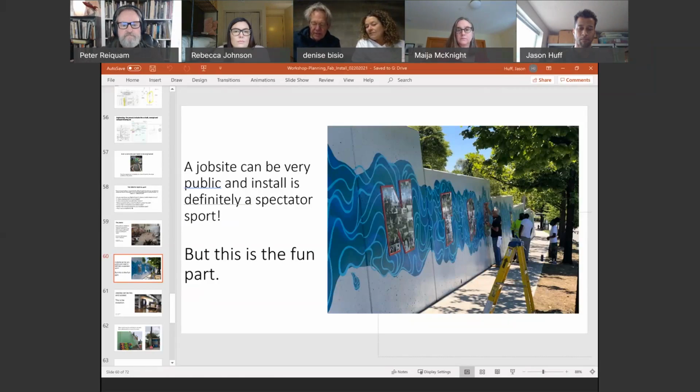I guess what I'm trying to say is your assumptions have to be noted to your client so that they understand what you have included and what you have thought about. The client may say, wait, did you realize that this post is already there, or that post is falling over, you can't use that? So let them know what you're thinking about. Write that stuff down and present it as an assumption. It's a liability kind of thing for yourself.